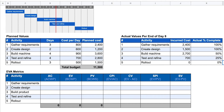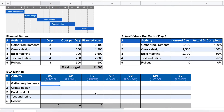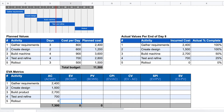Now let's calculate the actual earned value metrics. The actual cost is simply how much money we have spent on the work so far. Activity one: $2,400 (exactly as planned). Activity two: $1,500, which is $300 more than planned. Activity three: $2,700. Activity four: $700. Activity five hasn't started yet and we haven't spent any money on it. The total actual cost to date is $7,300.